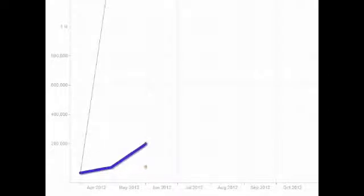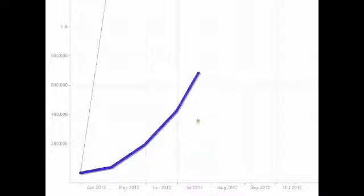This graph represents money versus time. Construction production is not linear. Production at the beginning is slow and as the middle of the project nears, more trades are all working at once.